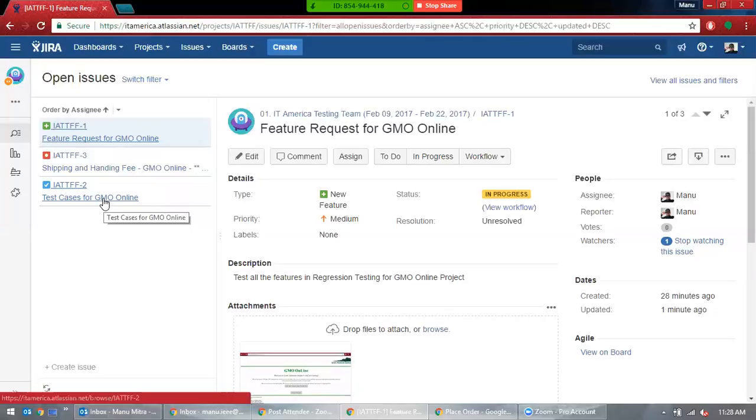It's always better to have a small number of people working on a small chunk of work, rather than a large number of people on a large chunk, because it creates a lot of confusion and chaos. Five people is easy to manage: 2 developers, 2 testers, 1 project manager. That's good.